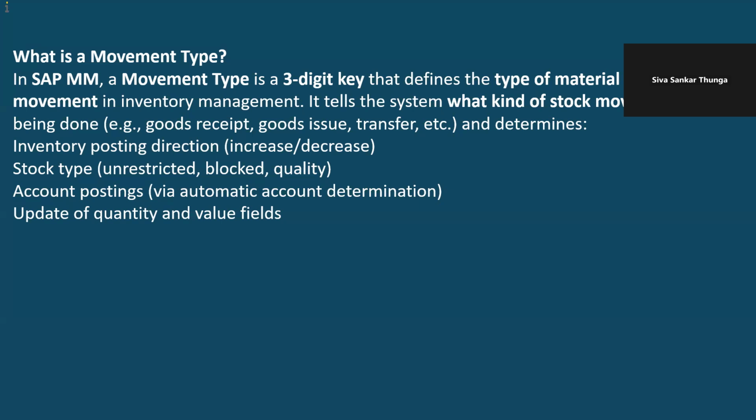So this is nothing but three-way matching with respect to the PO. They will ensure that the quantities in the PO, the quantities in the GRN, and the quantities in the invoice must be matched, as well as the value. So that is nothing but the three-way matching principle they will follow. If everything is matched, they will proceed.